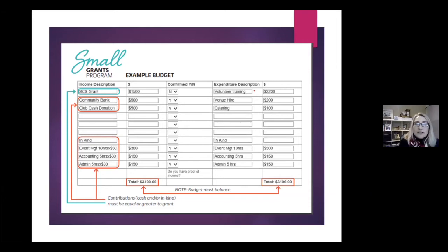Yes, no, I totally understand what you're talking about. Yes, because it's unconfirmed, the funder may come back to you and say, have you got confirmation of that funding yet? And if you were to say no, you haven't, the next question they will most likely ask is, in the scope of your project, what can you do without if you don't get that money?